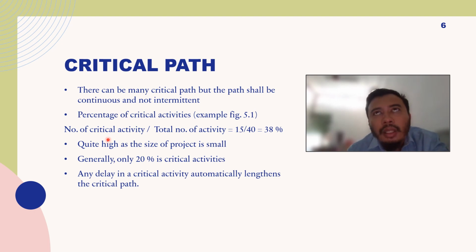If the ending date has been fixed by the contract, the sequence of work needs to be changed, and you might need to pay more attention to the critical path and the critical activities. It helps you concentrate on which paths are critical for your project.